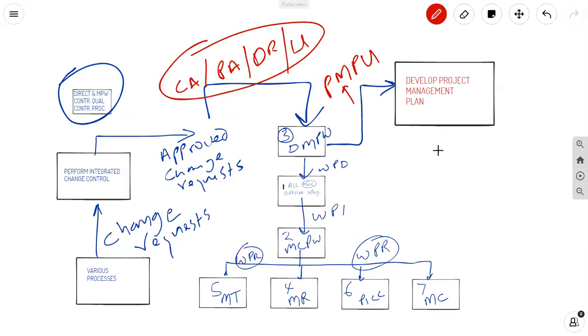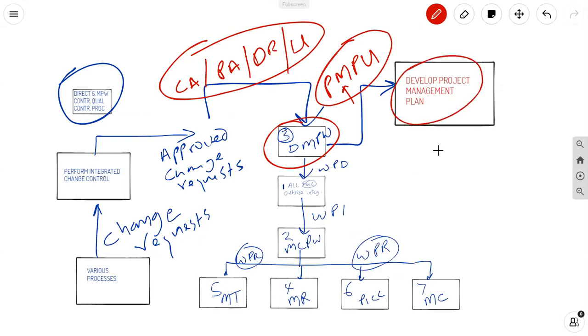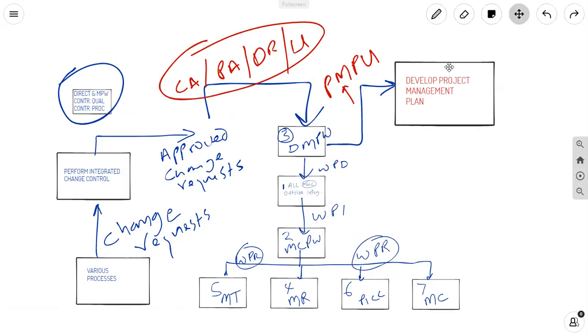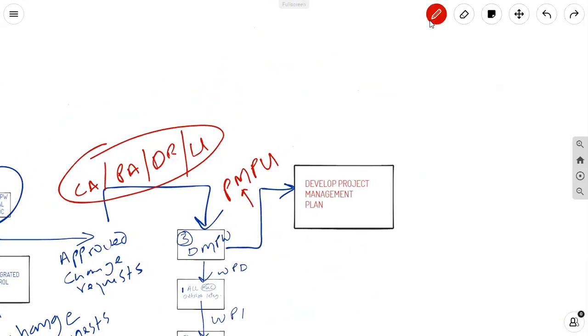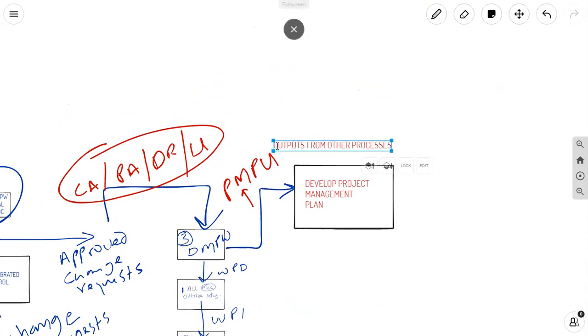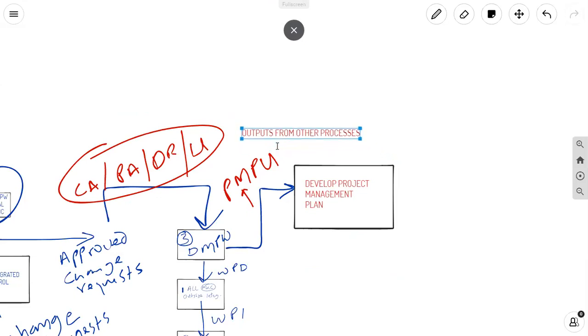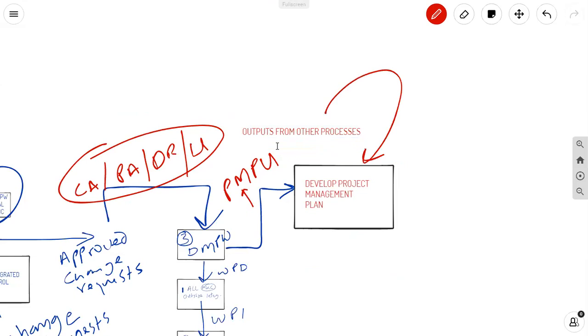But ultimately, you need to think about these being funneled into DMPW. As these approved change requests are funneled in here for rework, they eventually make their way into the developed project management plan process, but they do not come under the name you are expecting. These updates come in the form of outputs from other processes. And that is why you see outputs from other processes as a mentioned input to the developed project management plan process.